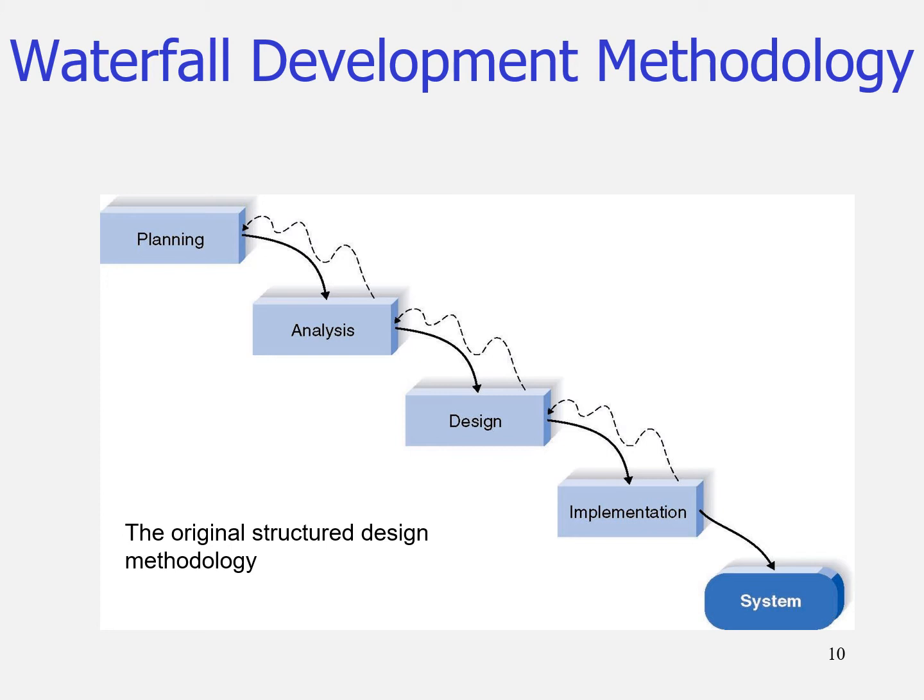This is the concept of waterfall. You do one by one, and if analysis is not finished, you cannot start design. Let's say there is something wrong. You realize that there is something wrong in the planning part. It does not go back. So this kind of methodology is slightly very inflexible.